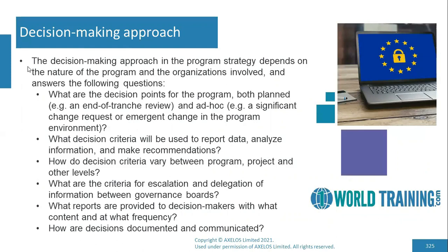The decision-making approach, one of the 3 approaches within this theme. As we know, the approaches in the program strategy depend on the nature of the program, the nature of the organizations involved, and many other factors. In particular, this decision-making approach is about understanding the various decision points of the program, both the planned and ad hoc. A planned example could be an end of tranche review where a decision is made, and an ad hoc or a specific decision point could be a significant change request or an emergent change in the program environment. For example, a change in the economy.